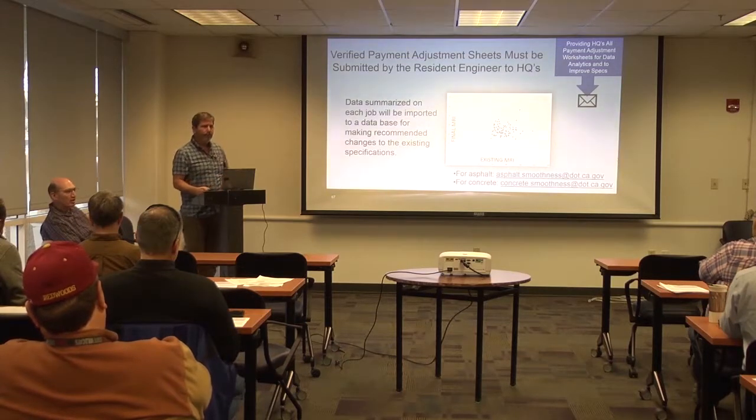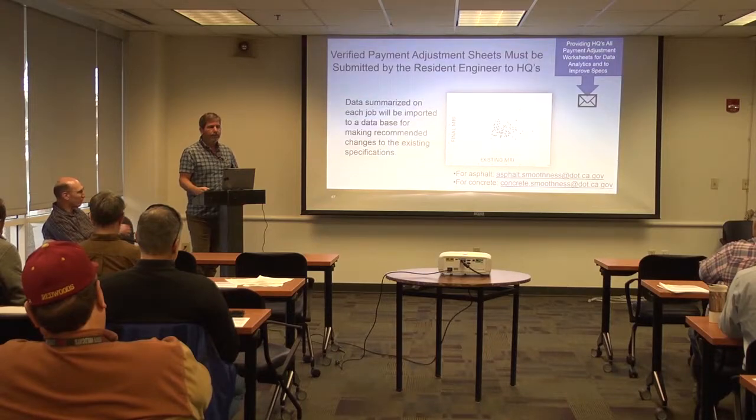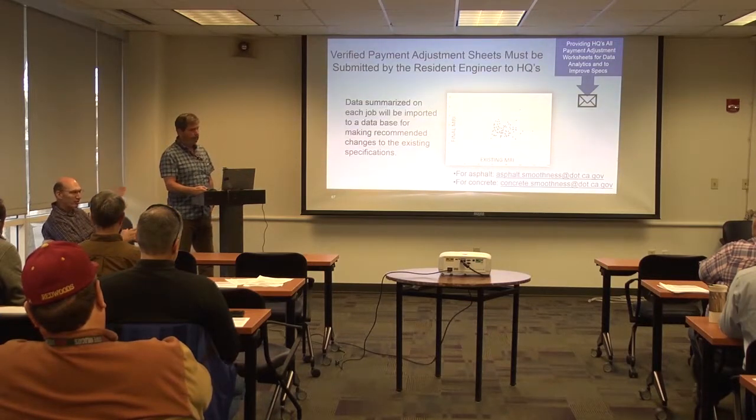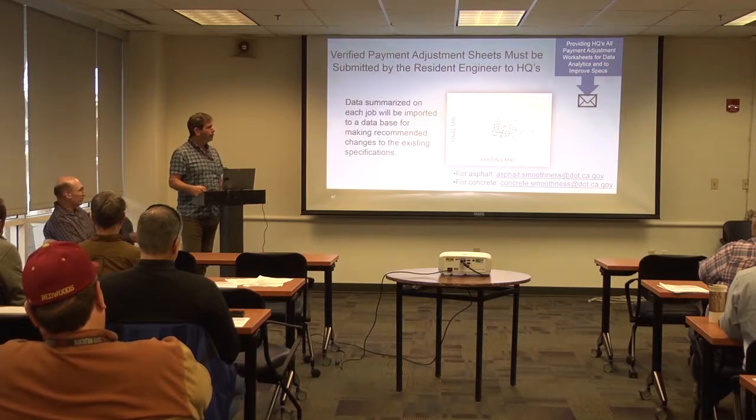with the project. The specs are going to pay them a little bit more of an incentive, like Pete was saying, if it's a percent improvement job, if the pavement got a little bit rougher. There are target zones in these. We've got wider target zones. We don't have the hard line of 60. I don't think you're going to get into all these fights over unachievable pavement. And you'll see that as we get into some of the pavement smoothness values in the afternoon.